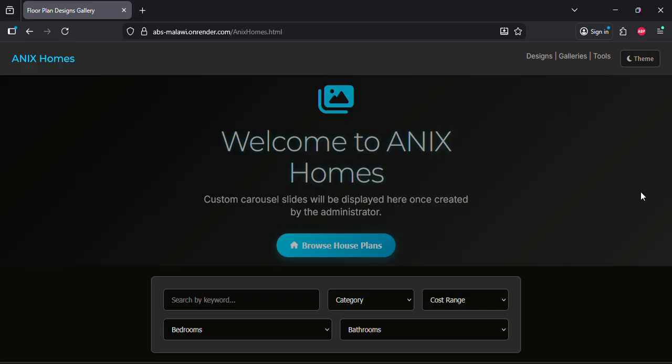And the good thing is, all those house plans are directly connected to the Anix building system estimation algorithms. So whenever a user clicks a house plan, the estimates that come up are already detailed: if you choose this house plan, at the prices in the system, which are current on the market, this is how much this house would cost, and these are the total breakdowns of each and every phase. So the user can find somewhere to start from, instead of spending millions on getting a design and a quantity surveyor, and use those millions to start the actual development of the property.